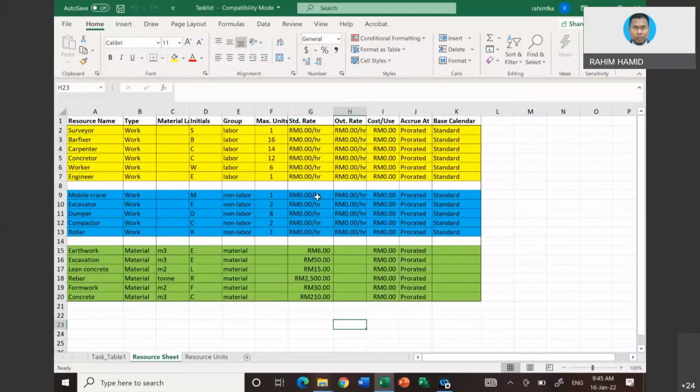Normally, what we put is basically to be equivalent to the contract document so that the client can trace the activity in accordance with the BQ and so on. Why? Because when you input into the contract document, you input according to the unit rate of material, and the unit rate of material is already inclusive of man, machine, and profit.